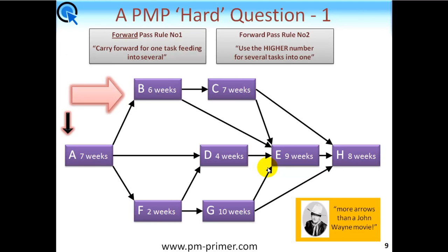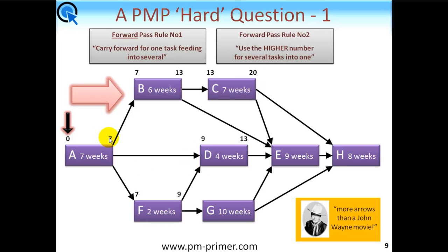Let's go through this exactly as you'd do under exam conditions. Take the first task, put a zero there and add the duration, giving seven. This obviously feeds into three tasks. I notice one of them has two arrows going into it, so I'll leave that for the moment and do the easy ones first. We take this seven — one task feeding into several — so seven goes straight up here, add the duration, making 13. Seven also goes down here, add the duration, making nine. Simply one task after another with one arrow in: carry 13 across, add the duration, giving 20. In the middle, two arrows come in showing seven and nine — use the highest number, so nine comes here. Nine plus four gives 13. Down here it's only one input, so carry nine across, add the duration, giving 19.